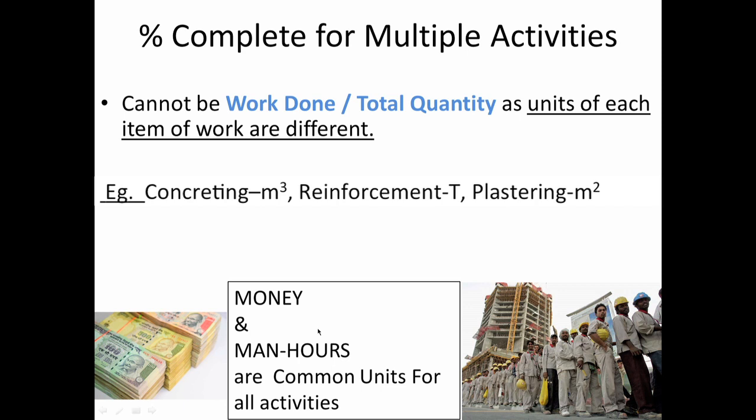I can use either metric as my indicator for the value of work earned, or the earned value, and for the remainder of this lecture we will use money as the indicator, although man hours is also used. Towards the end of the lecture I will give you an insight as to why we should make this choice, and what the implications of this choice are.